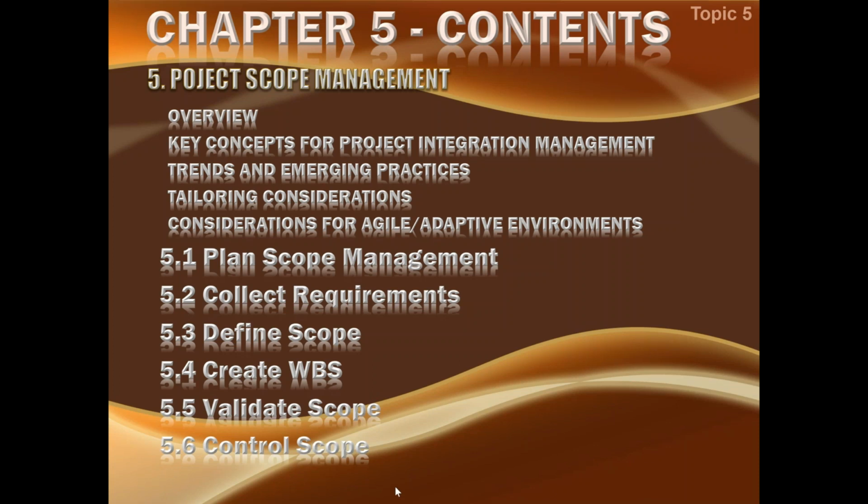And in closing, we don't need any other knowledge area. Integration is responsible for closing the project or phase. Therefore, as far as scope is concerned, we have scope processes only in planning and in monitoring and control.